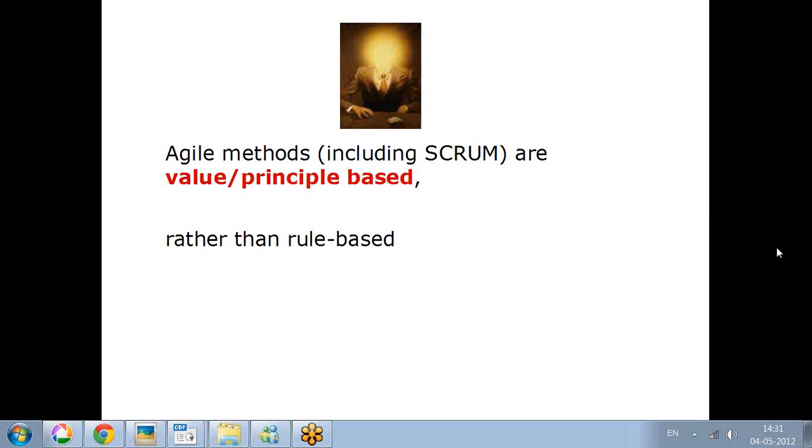So scope is not controlled in Scrum. Scope is just evaluated. If it is mandatory, you have to deliver it. And the contract type which we are signing with the customer should be conducive for that. In a fixed price contract in its classical form, sometimes it may be difficult. Maybe a time and material will work. A time and material, or a fixed price with a time and material with a cap, that's fine. And in fixed price also we have the provision for change requests.